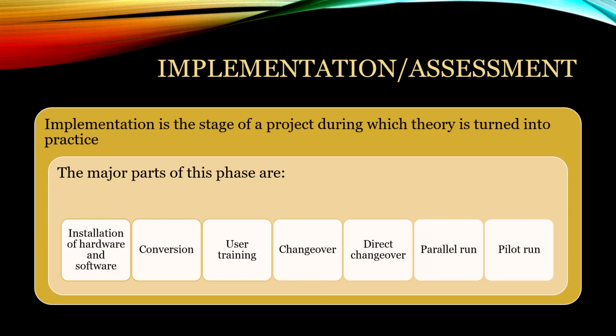A parallel run, both systems are in place and you slowly get people migrating to the new system. Pilot run is basically the new system is running with the data from the old one and previous periods from the entire system are there. And then we're trying to check the results off of both of them. Parallel run is what I see the most often. However, organizations that don't plan it out, definitely direct changeover is where it is. Oftentimes they don't want duplicate data, so I see the direct changeover and then just dealing with the growth issues as they occur. So let's dive into these subsections.